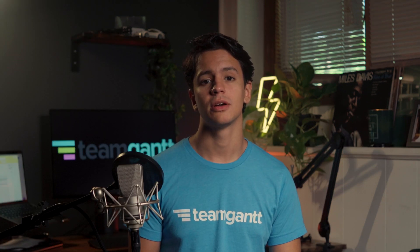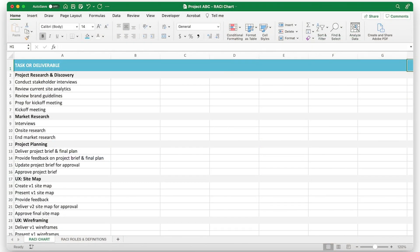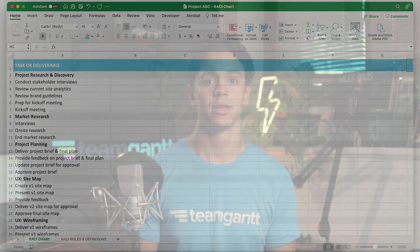First, make a list of all of the work that needs to be done for your project on the left side of your RACI chart. Enter each project task, milestone, or decision in column A of your Excel worksheet. Feel free to group tasks by project phase like we've done in this RACI chart example shown here. That way, your RACI matrix is easy to scan and read.